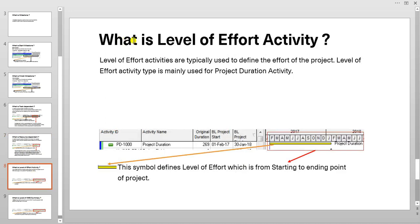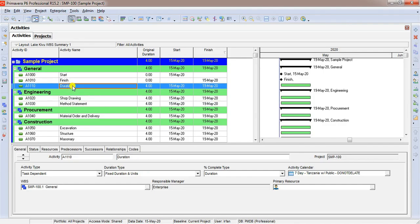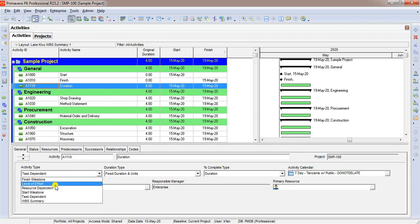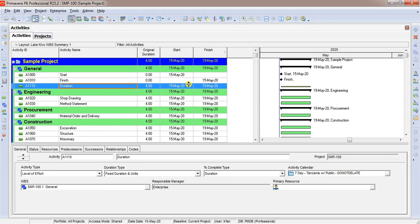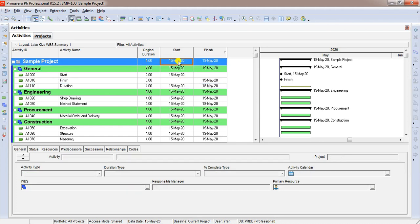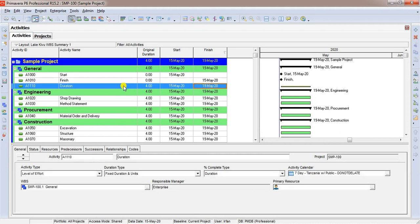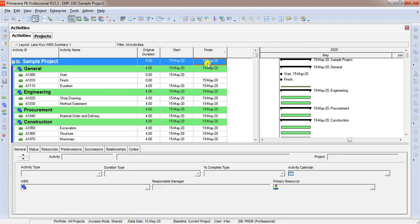What is level of effort activity? Level of effort activities are typically used to define the effort of the project. Or in simple words, level of effort activity type defines summary of project start and finish date. Let us go to Primavera and see how it behaves. We have an activity called duration. We are going to change this activity duration because this activity is considered as project duration, and we are going to assign activity type as level of effort activity. We change this to level of effort activity and nothing is changed. Why it's not changed? As I told you, it shows project summary. The date here 15th May, we have project start date 15th May. Finish date for the activity 19th May, the same date we have for project completion.